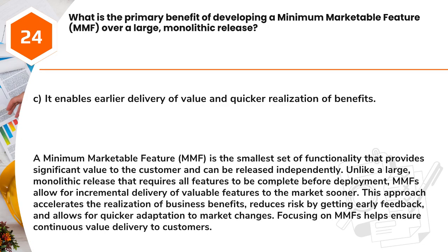Answer: C. It enables earlier delivery of value and quicker realization of benefits. A minimum marketable feature, MMF, is the smallest set of functionality that provides significant value to the customer and can be released independently. Unlike a large, monolithic release that requires all features to be complete before deployment, MMFs allow for incremental delivery of valuable features to the market sooner.